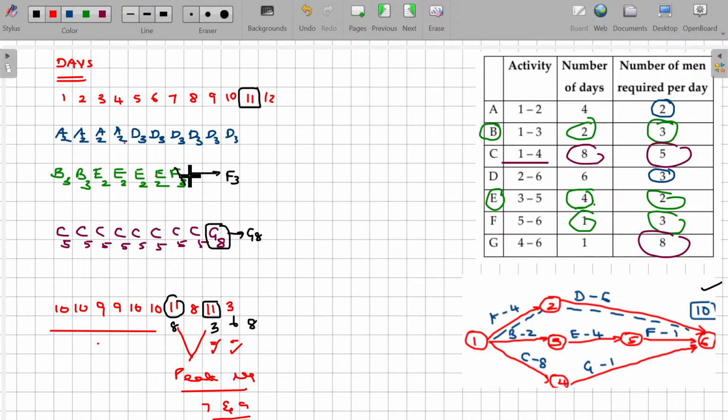So if I shift E from here to here, automatically what happens? If I shift these days, 3 becomes 3 plus 2, 5, and 6 becomes 6 plus 2, 8, but on these 2 days, it becomes 8, 8 only. In such a way, all the employees will not be overloaded. Some employees may take rest. That's called resource smoothing.